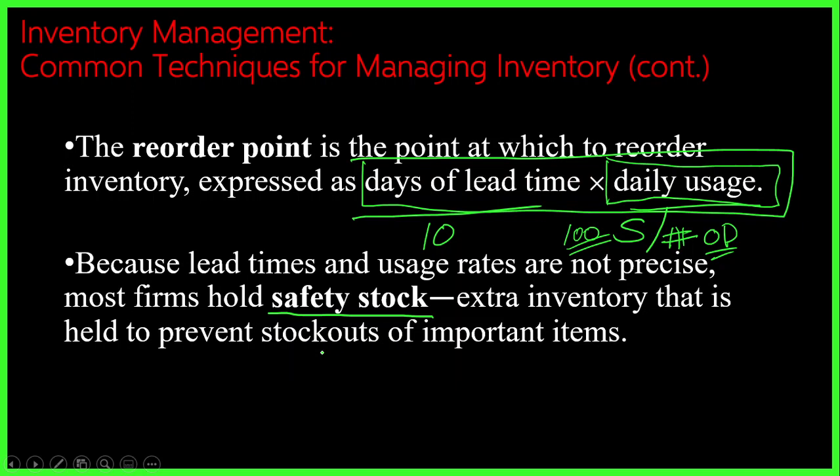For example, your normal lead time is 10 days and the maximum lead time is 15 days. Normally the products can be delivered after 10 days, but if there are fortuitous, unforeseen events, it can reach 15 days. So you have to store some safety stock which is good for the difference of your lead time, that will be 15 and 10 days.